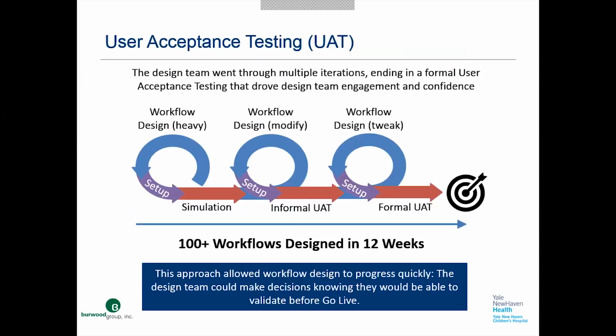This was followed by an informal user acceptance testing, resulting in small changes before a final formal user acceptance testing. This was a quick process, but engaged the design team and helped them gain confidence in the system and their design decisions.